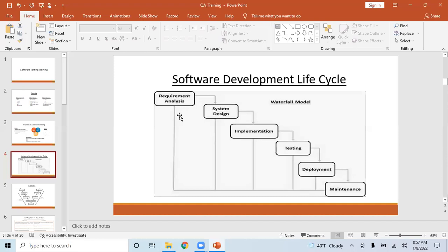One of the project managers and one of the technical software architects went to the client place. They understood the requirement at a very high level. They saw the client's Windows application, how many screens there are, and based on their previous experience of developing web applications, they said, okay, we will complete converting this Windows application to a web application in 6 months, and this is the cost for it.